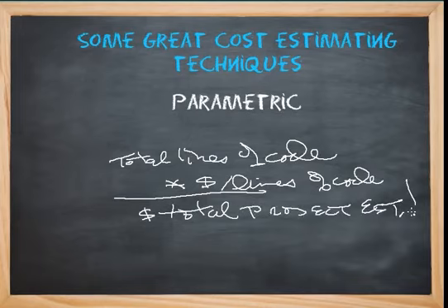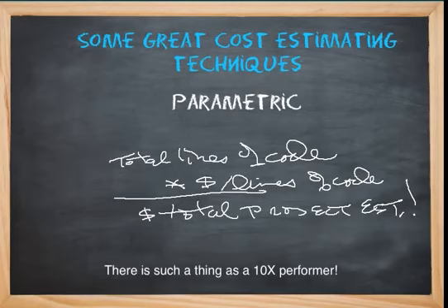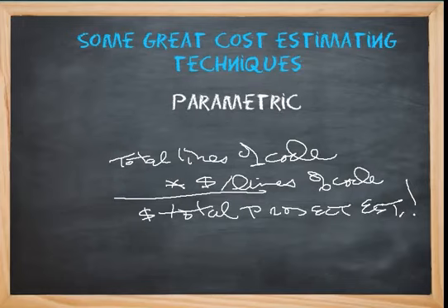Hogwash. Oh. There's no way. There's some pretty big gotchas with this approach. To come up with a qualified model, however, you need to factor in the skill level of the development staff, which needs to examine the 10x multiplier that states the best engineers may be as much as 10 times more effective, more productive than others. So this has tremendous risk associated with cost estimating, especially in how you would assign the cost.